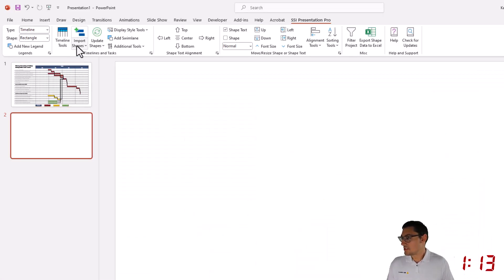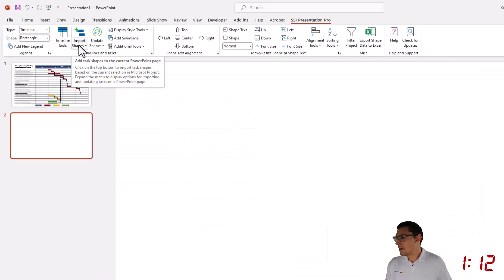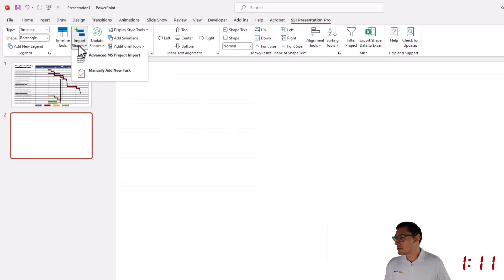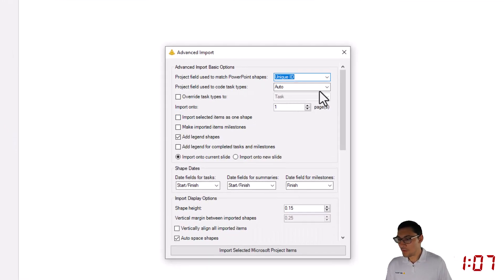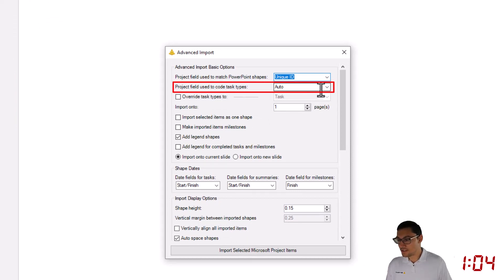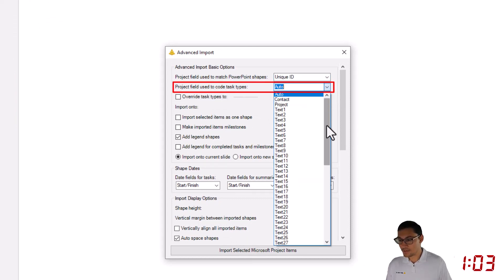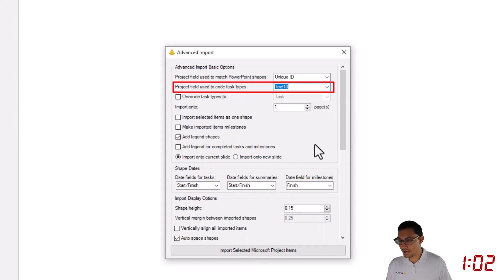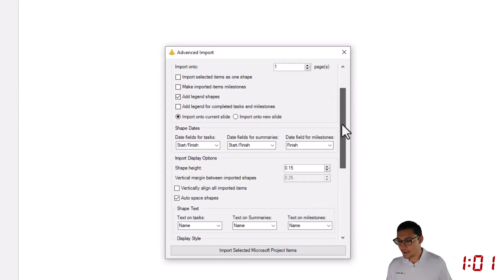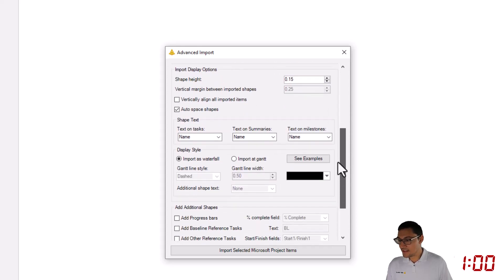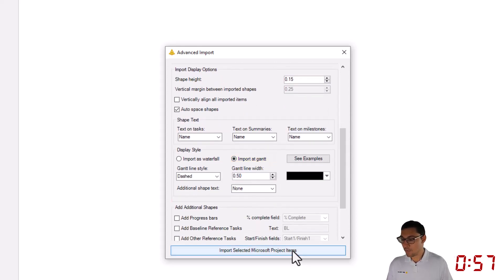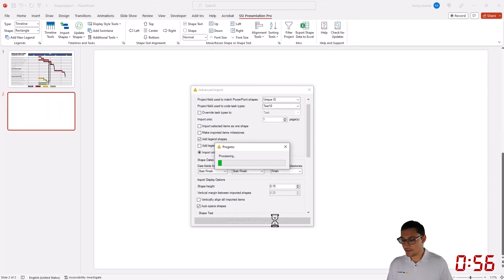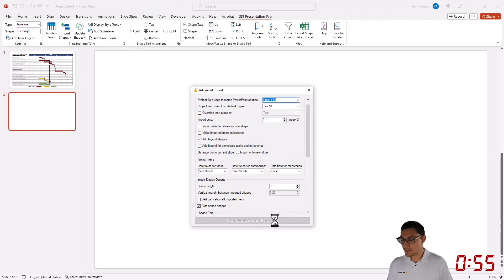Now I'm going to click the lower half of the Import Shapes button, click Advanced MS Project Import. On this form, I'm going to change the project field used to code task types from Auto to Text10, set the display style to be imported as Gantt, and click Import Selected Microsoft Project Items.